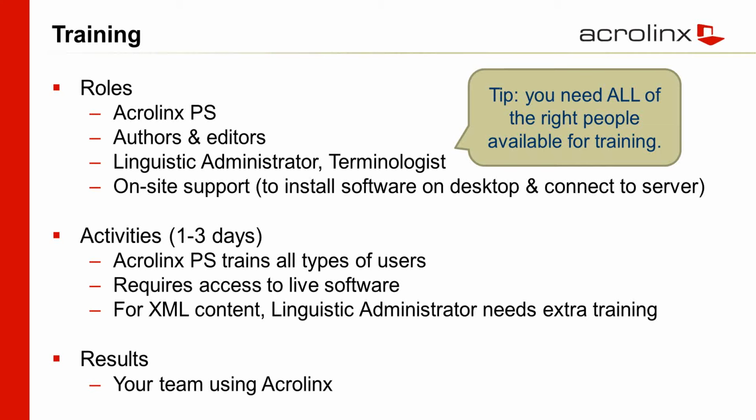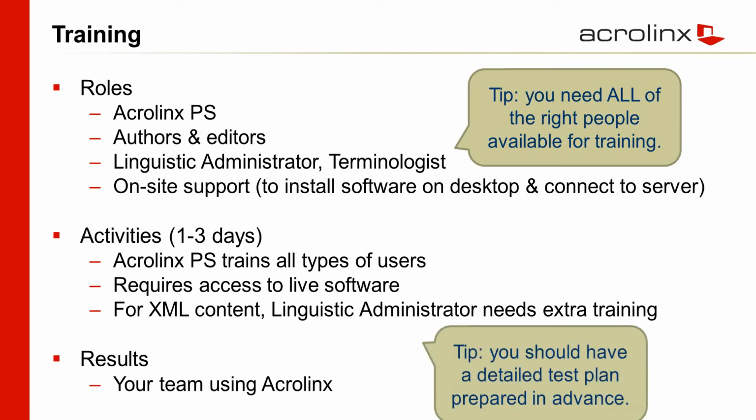They're using it. They're understanding it. They're using it, and they're reporting back on results. It's not enough just to use it and say, here, go at it and see what you come up with. Work with the users in advance so they know what they're going to be doing with it. Not just, well, start using it, but have a test plan prepared in advance.